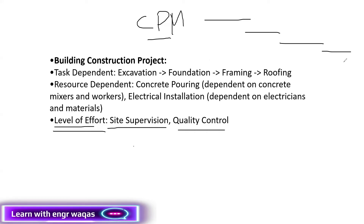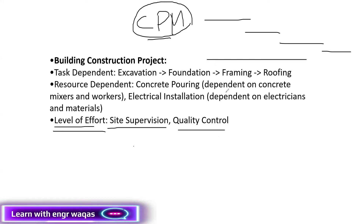All other routes will take extra time — that is CPM. So when Primavera P6 calculates CPM, if my client has instructed me that I should incorporate other plans in P6 — like a project management support team or quality control team — these are secondary things, not direct project tasks, they are supervisory tasks. Primavera P6 might make a mistake and include those tasks in CPM, and the CPM calculation will be malfunctioned.